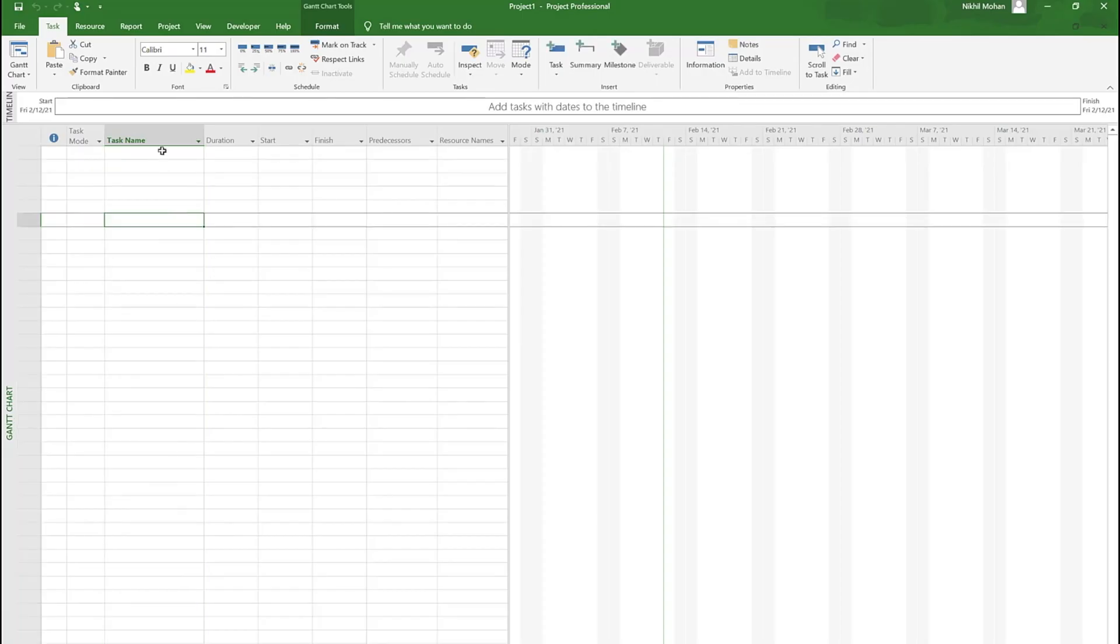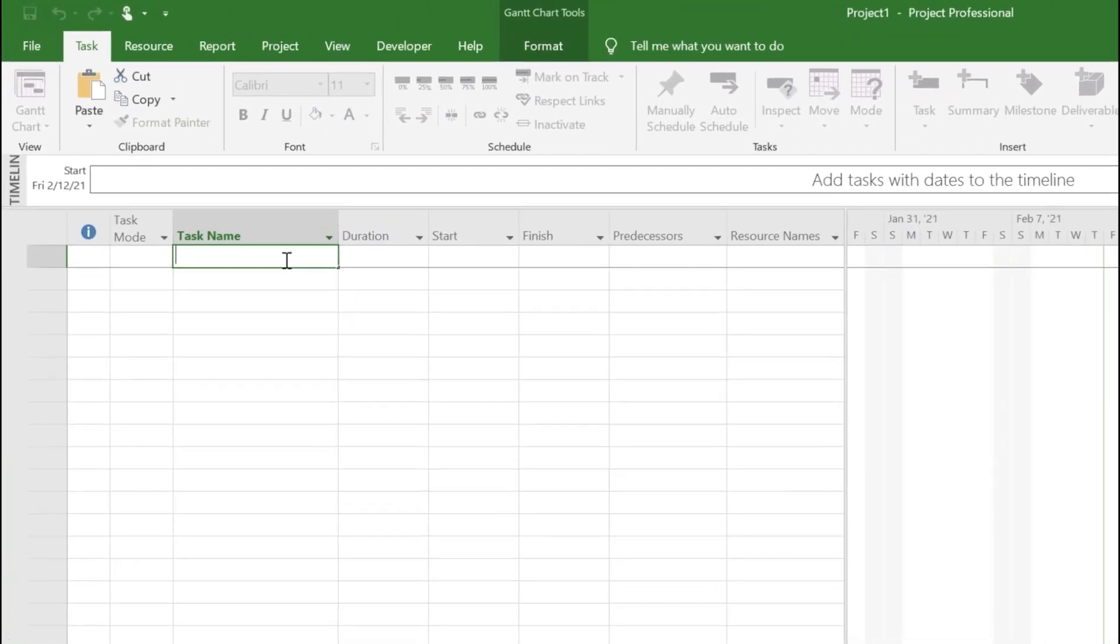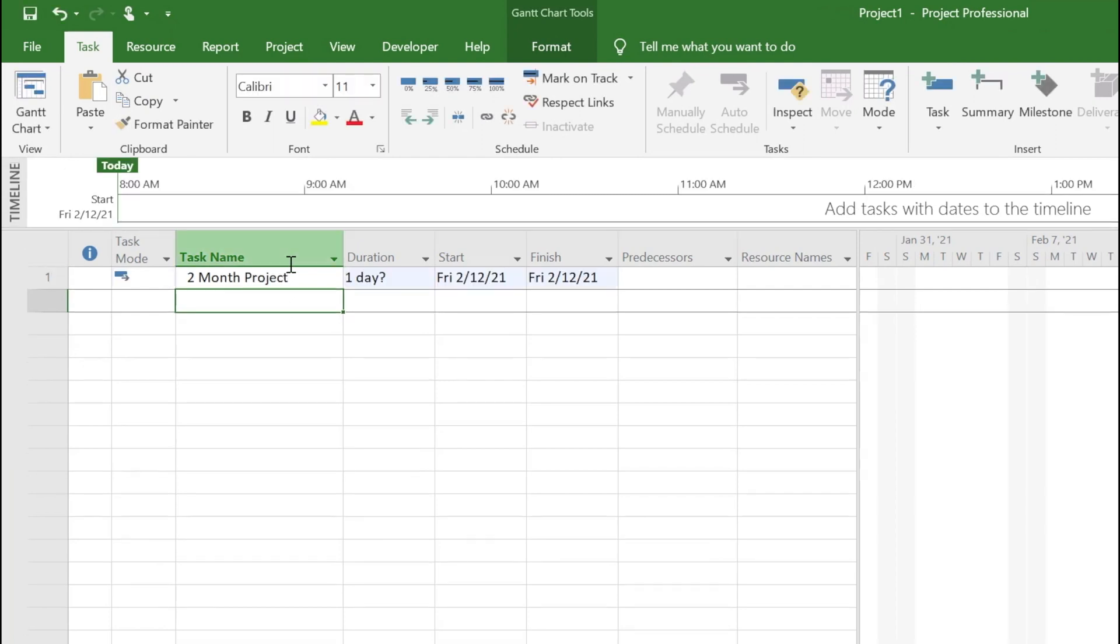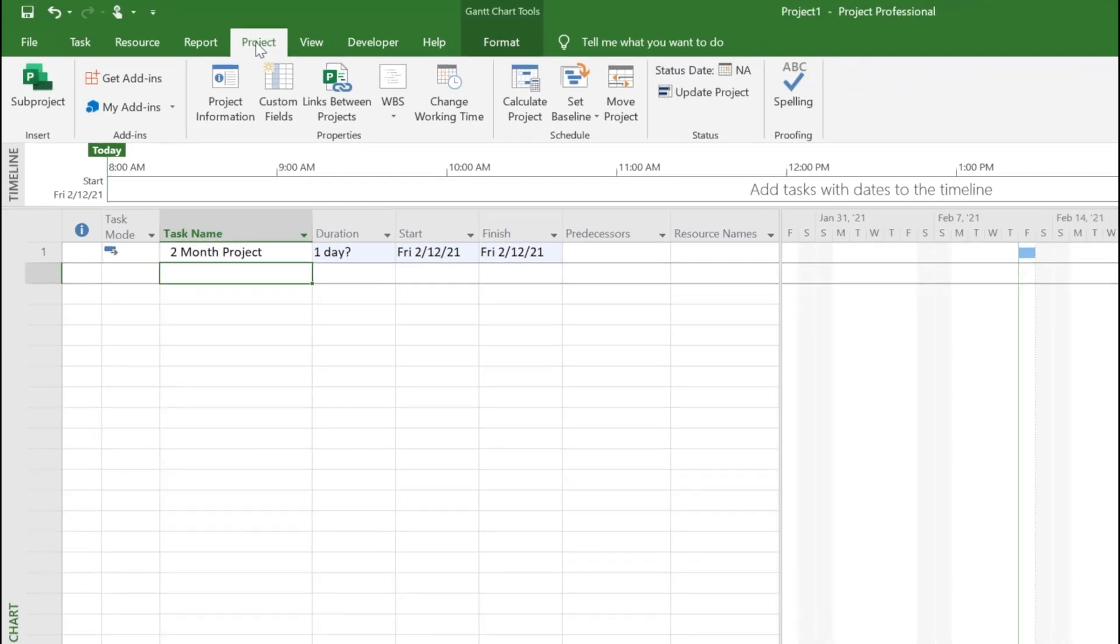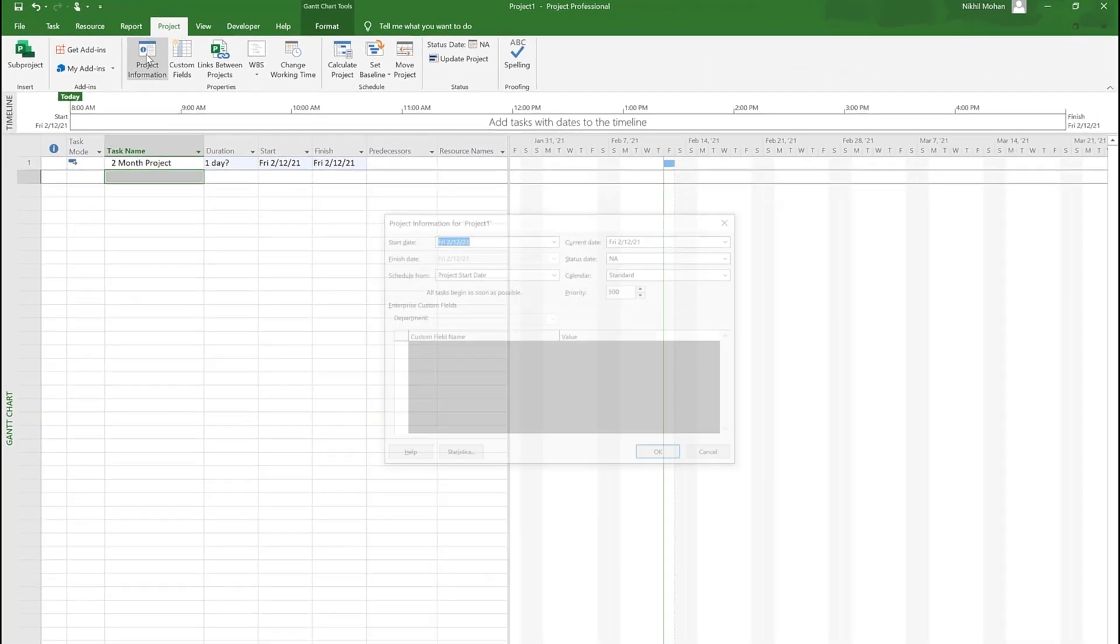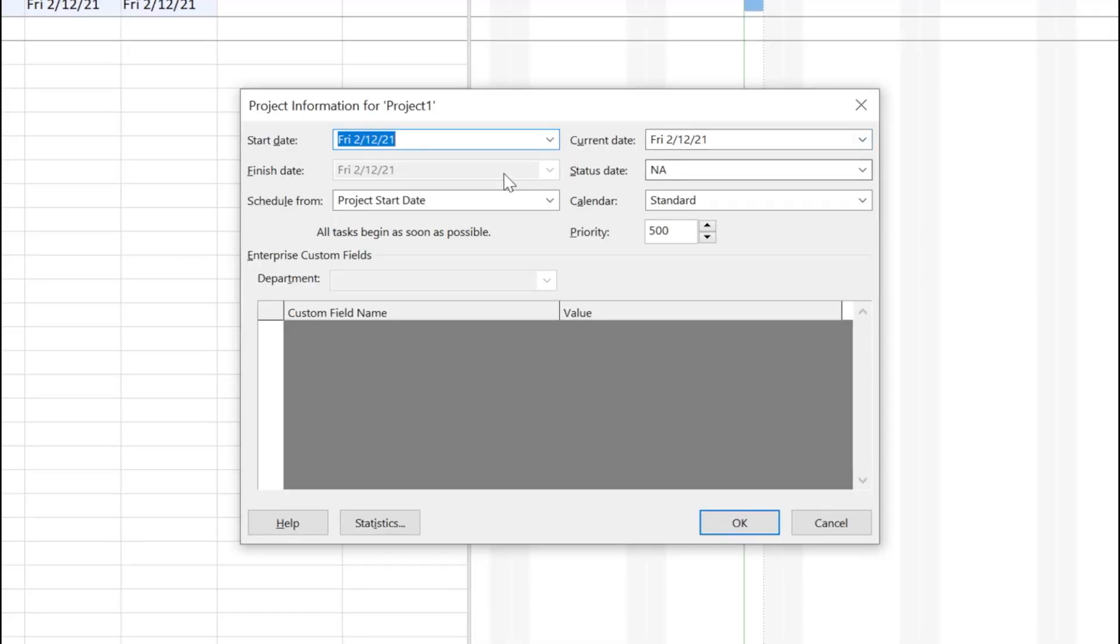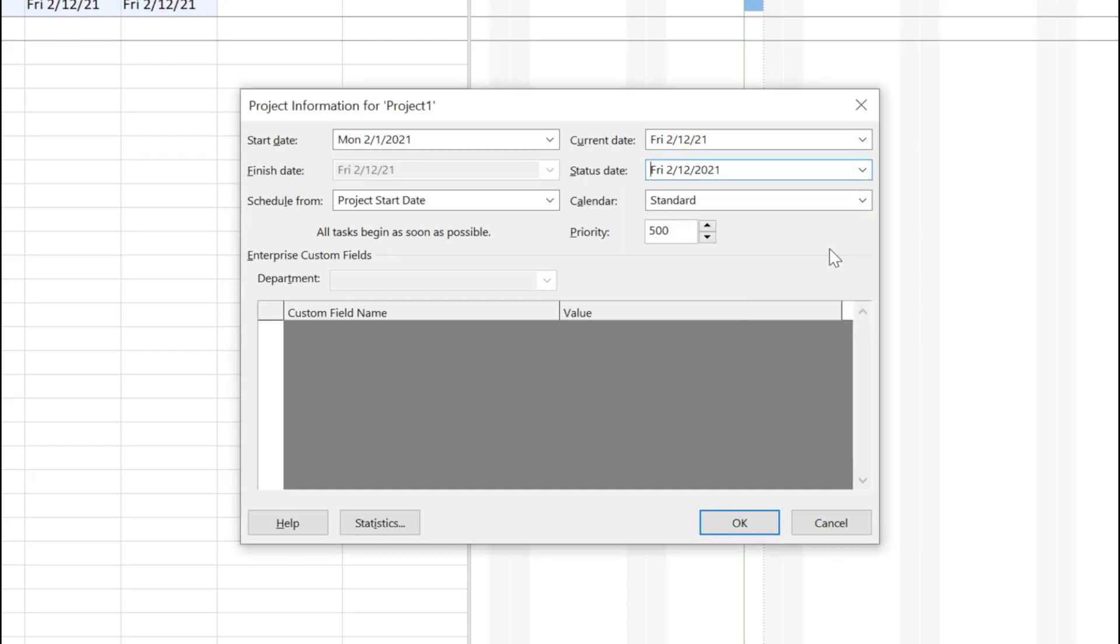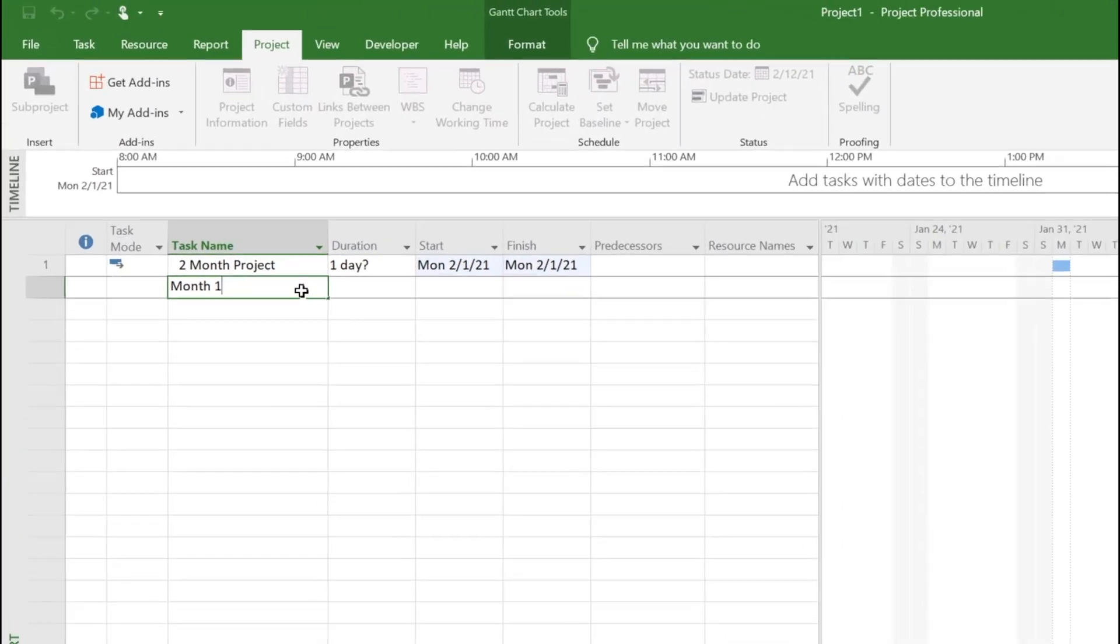We'll start with a blank project called two-month project. What I want to show here is a flag that tells you if any tasks are delayed. Before we get started, go to project information and set the project start date as first of Feb and the status date as of today, so that we have month one.